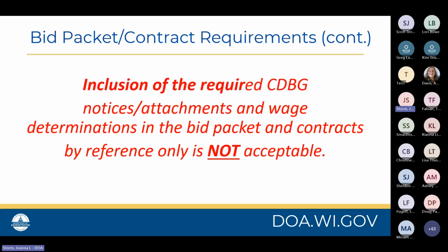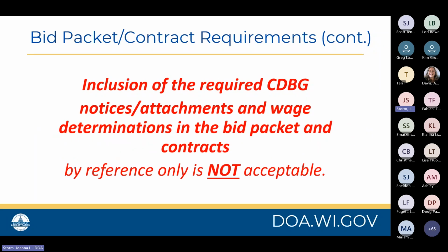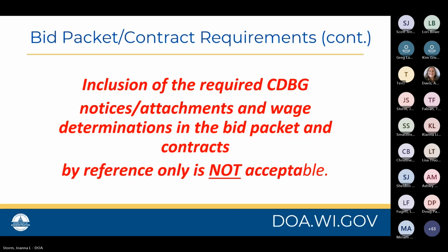Inclusion of the required CDBG notices, attachments, and wage determinations in the bid packets and contracts by reference only is not acceptable. So you can't have a simple line in there saying, oh yeah, we also include this particular document. The full language needs to be included in both the bid packets and the contracts.